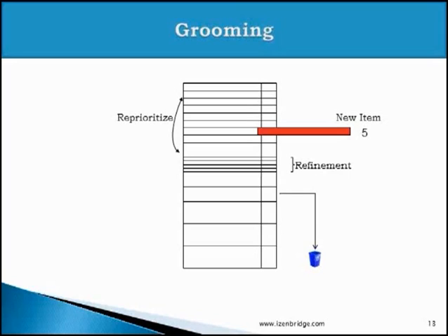And sizing of these new items. Let us look at it again: detailing, emerging, adding, removing, estimating, and prioritizing. All these activities are called product backlog grooming. So we need to size, we need to re-estimate the refined stories. For example, there was an epic which got divided into 5 stories. Now these 5 stories need to be re-estimated. The item which we are adding, like the question which was asked, somebody is adding a coupon. So what should we do?